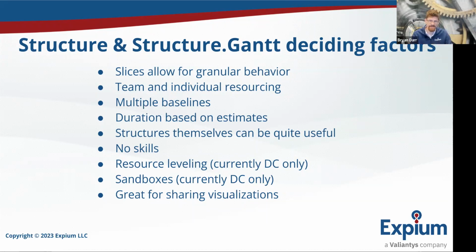So just the work breakdown side, you can present a lot of information in that with those formulas, and the way you build structures too allows you to surface data consistency problems within your tool as well. Again, there's no skills. You can do resource leveling, but only in data center, and you can do sandboxes, but only in data center.